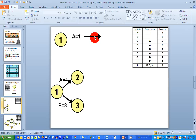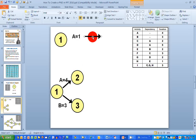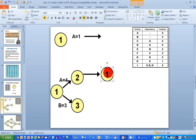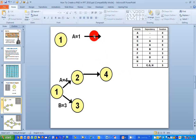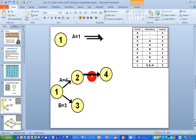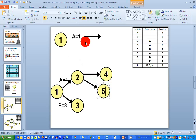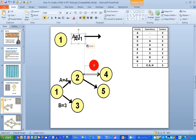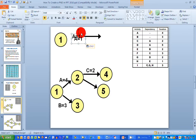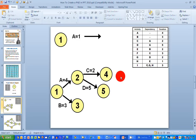The next two activities, C and D, are both dependent on activity A being complete. Node two represents the end of activity A, so it also represents the beginning of activities C and D. I'm putting in two arrows for these activities, with end nodes: node four for activity C and node five for activity D. Activity C has a duration of two days, and activity D has a duration of five days — D equals five. My first four of nine activities are now on the diagram with their arrows, names, durations, and start and end nodes.